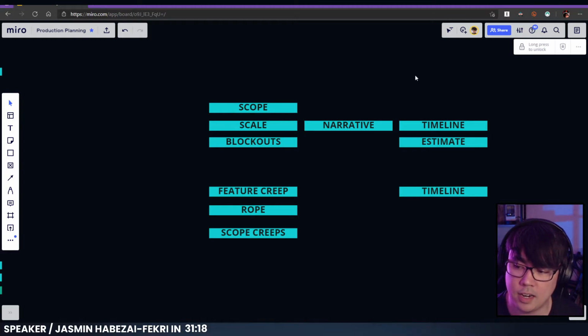Sometimes several people guessing together is a great way to agree on the assumption of accuracy. The other thing is if you have a team, maybe someone's really good at foliage and someone else is really good at hard surface. It's probably better to give hard surface tasks to the person interested in hard surface, and have the foliage artist doing foliage. If you reverse those, the estimates are going to be different. It can be easy to estimate a task with a general estimate, but we should also remember that who is working on what changes those estimates.